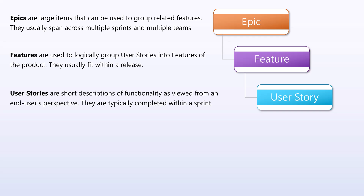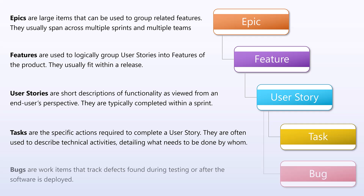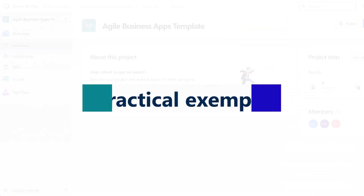Epics are large items that can be used to group related features. They usually span across multiple sprints and multiple teams. Tasks are the specific actions required to complete a user story. They are often used to describe technical activities, detailing what needs to be done and by whom. Bugs are work items that track defects found during testing or after the software is deployed.